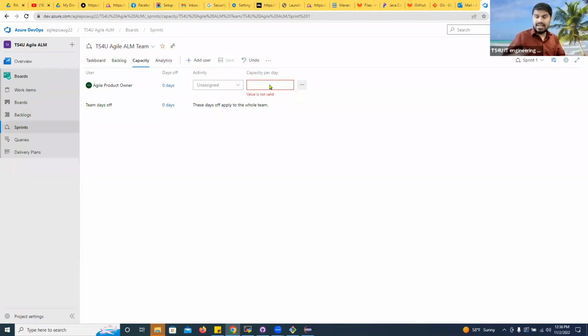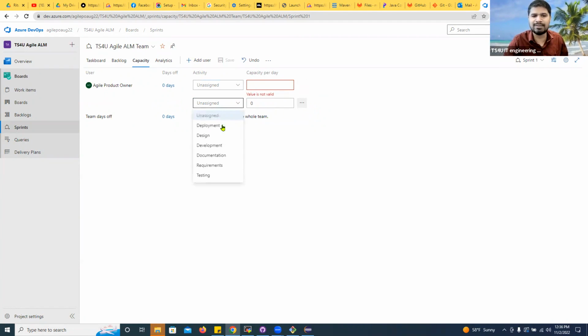And another option is, if the team decides, as the product owner knows, that most team members have meetings 2.5 hours every day, then team-wise you give everybody 5 hours. Your working hours are 5 hours, and the remaining 3 hours you are in meetings. So that's your capacity. After you put in the capacity, you can actually add more activities. Look at this.